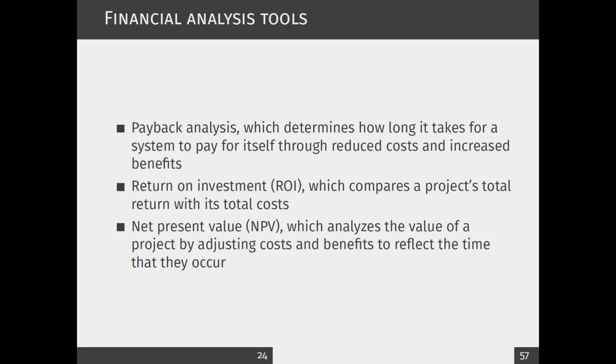In payback analysis, when you're developing software, we are going to spend some costs, right? You are spending some money. And when you implement the system, you are getting some benefits. It'll improve the efficiency, it'll make your work easier. So we will compare the costs as well as the benefits, and we will calculate how long it will take to match the cost that you have spent with the benefits that you are getting. This period is known as payback analysis.